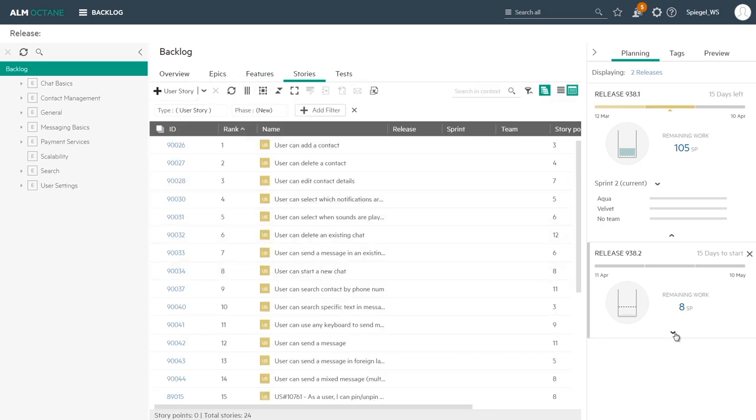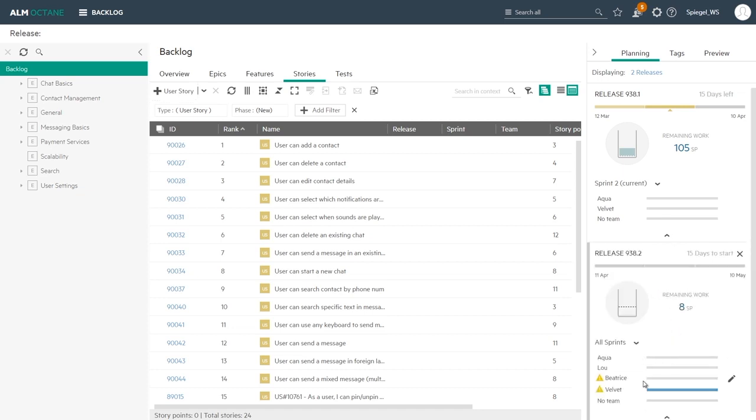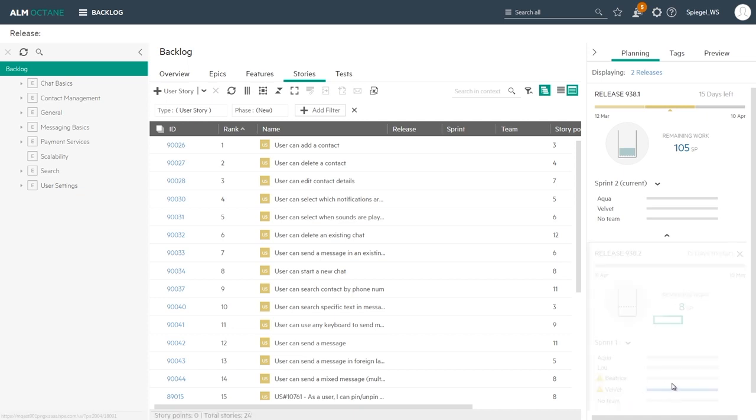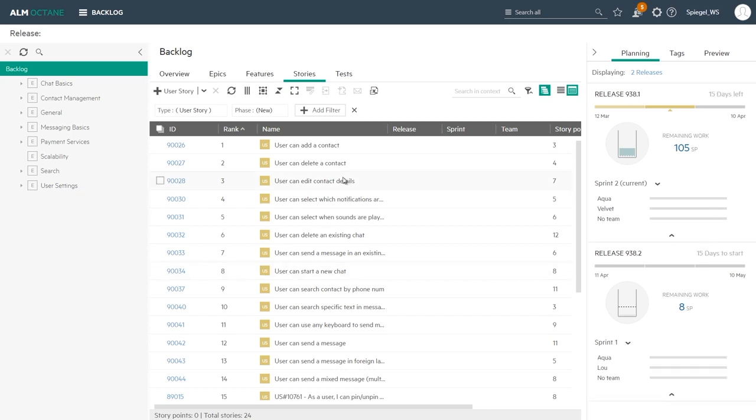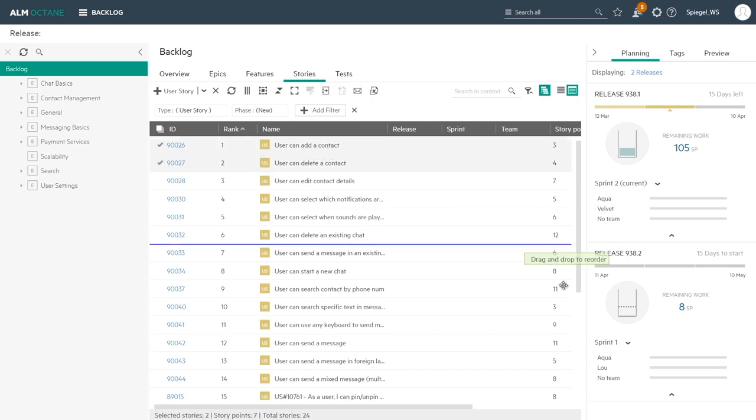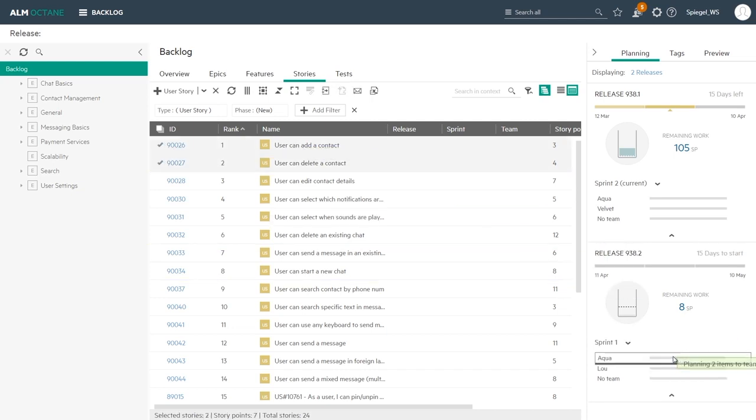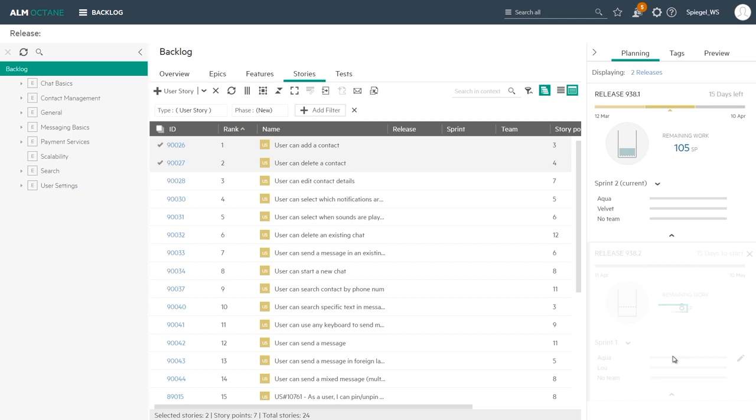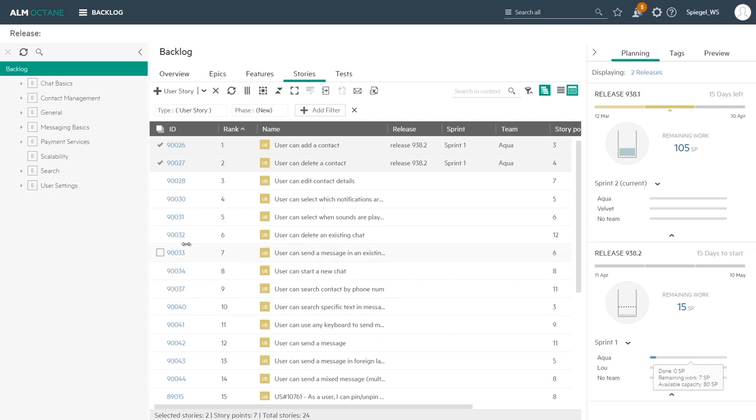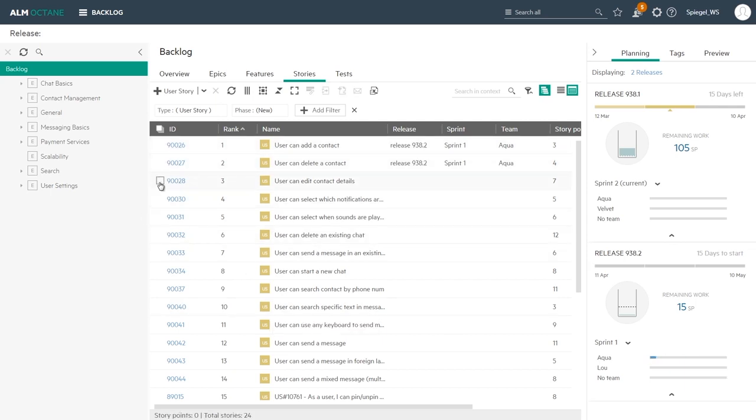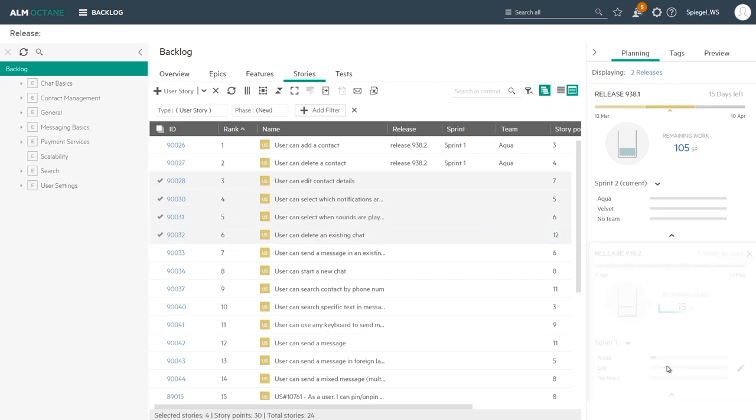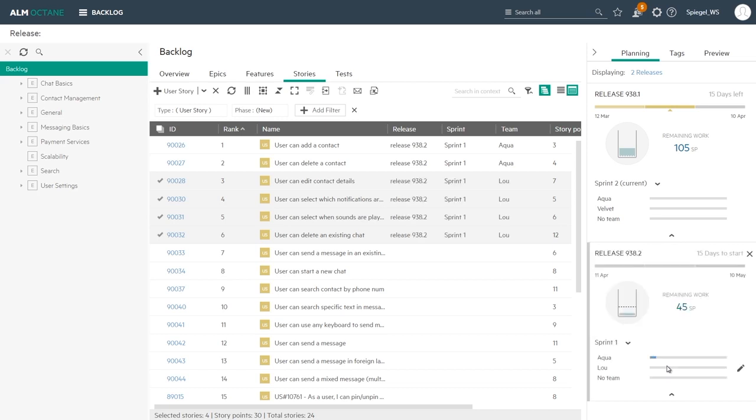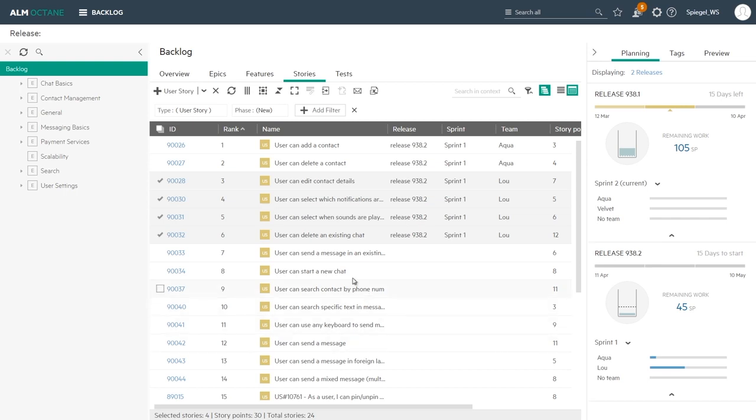Here the same I can do with stories. The stories I can also plan them, not just for the release but also for a particular sprint or a particular team. So I can select that sprint and then I see the teams that are available for that sprint. I can select the teams and the stories here that I want to allocate, let's say for Aqua team for sprint one. That seven story points of total is reflected in that bar of the Aqua team against their velocity in that sprint. I can select others. Let's take these four stories and plan them to be done by Lose team for sprint one. And again we see where we are in terms of the velocity available for Lose team and Aqua team for that sprint and continue to do that planning.